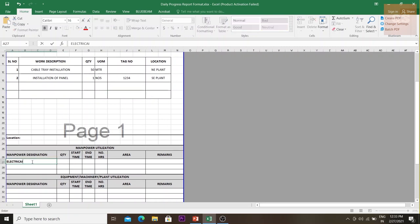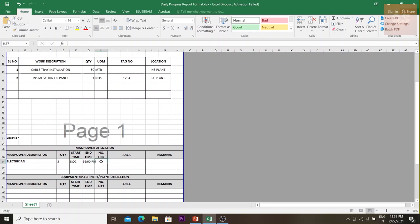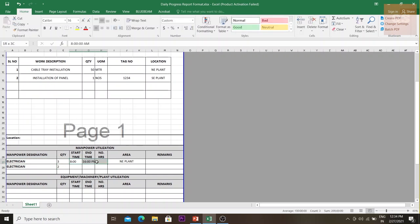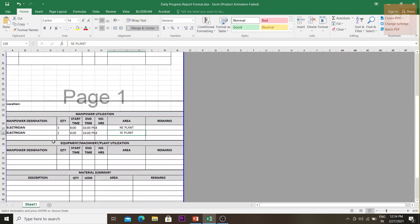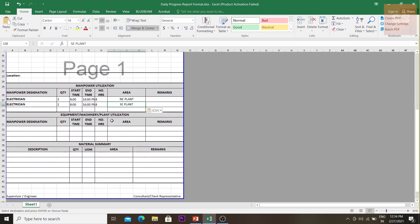For the manpower section, you would record: electricians — 3 people, start time 8 AM to 4 PM, total 8 hours, in the northeast plant for the cable tray installation. Then again, 2 electricians working the same hours in the southeast plant for the panel installation. This gives you all your manpower details in one place.